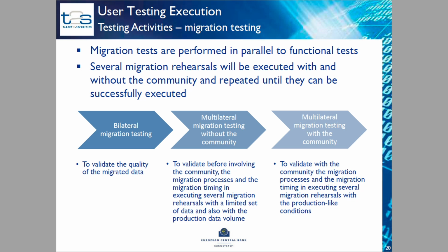The aim here is to make sure that the processes for the migration weekend, as well as the pre-migration phase, as well as the timing are correct and that they can actually be executed during the defined period. Okay, here we have to maybe be precise. We do not intend to do a pre-migration dress rehearsal over 3 months, but rather in a shorter time frame. So we don't have so much time to plan 3 months of one migration test rehearsal, but we will do it faster.